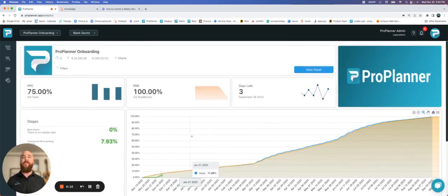But another thing that you can track is your PPC. So that is your percent planned complete. And that's simply a yes or no question. So when you commit a weekly plan and you commit 4 tasks, whenever you progress those, if you do not meet that progress that you committed to, then that's a no. So our PPC would be 3 out of 4. We completed 3 of the 4 tasks that we committed for that week. So now we can start tracking how well we're planning and make adjustments likewise. Was it weather or did we overplan?